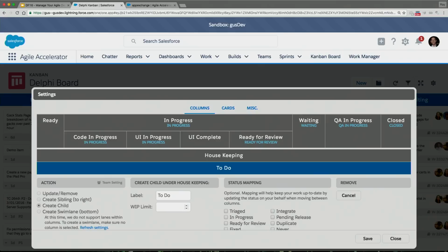You can have a swim lane here called emergencies. And then you should only ever be able to have, let's say you've got a team of 5, you should never have more than 5 emergencies at once. If really it's more like 2 developers, 2 testers, and a Scrum Master, then it's only 2 emergencies at once. And you can't have a product owner throwing in 12 things and saying they're all priority 1. And the work in progress limit helps hold them accountable to that.